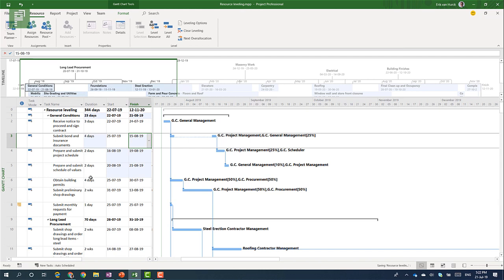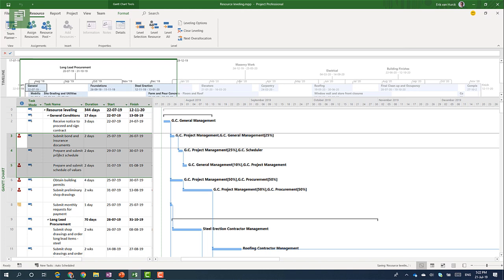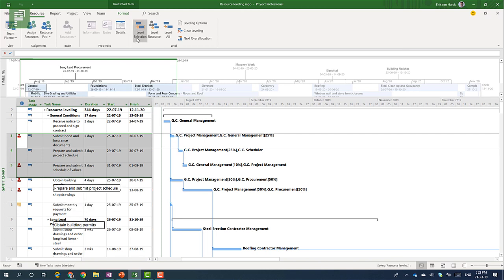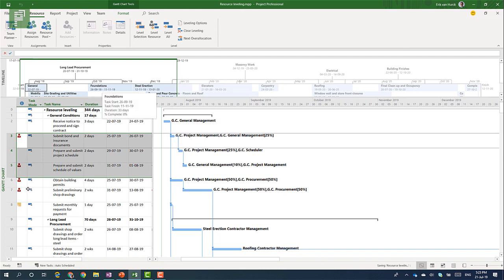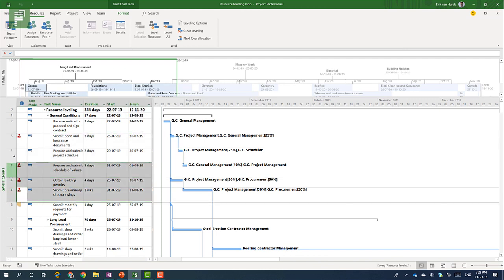And here we see that the overall allocation has been resolved in these specific tasks. What we see happening here is a split which basically means that a resource starts working here, then starts working here, and then starts working or finishing up the submit bond activity at the end of that task. So selecting these three tasks here doesn't solve any over allocation.